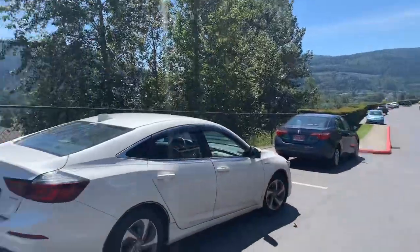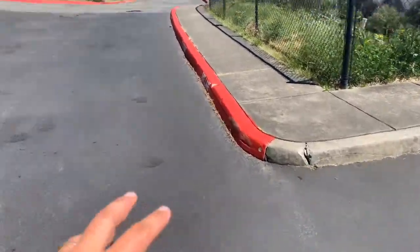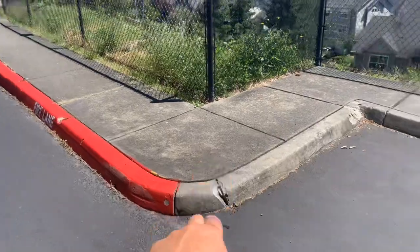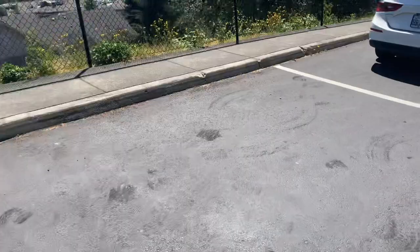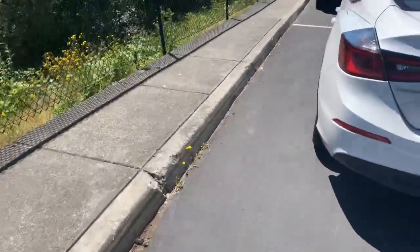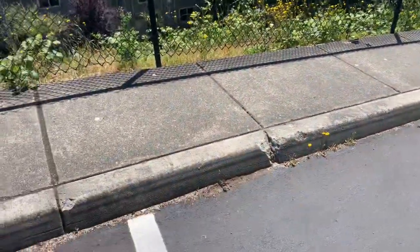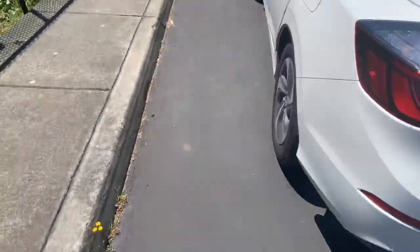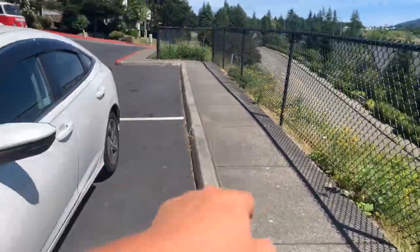There's a little bit of curb that we're going to have to fix down there. Because we have some curbing to fix, we might as well fix this area too. All right, so right here in front of the T unit, we've got this piece of curb all the way down to the corner. We're going to fix this whole thing, so we're going to rip that out. That's about 8 feet. Okay, so we'll take out that 8 feet. This busted out too, so we're going to take out this as well. It's approximately 12 feet, actually. These are like 4-foot squares here. So we'll go from this joint past here, and we'll stop at this joint.